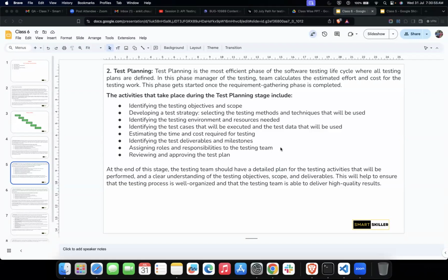Yes. And there would be lots of extra work or unnecessary test cases because everyone has created test cases for all the 10 requirements. That was not required. What would have been more efficient was to distribute those requirements, give 2 requirements to each tester, and tell them to prepare all the test cases. So we would not have wasted any time, and the coverage would have also increased.